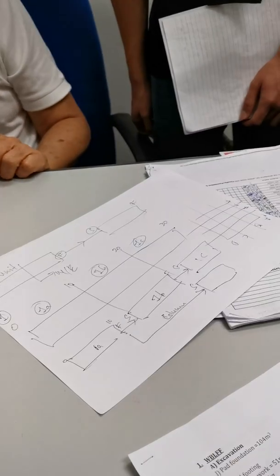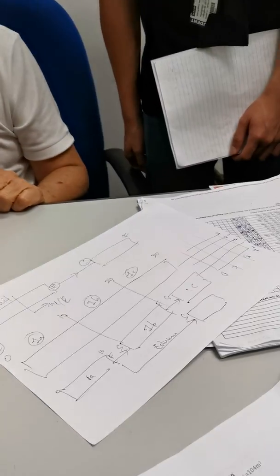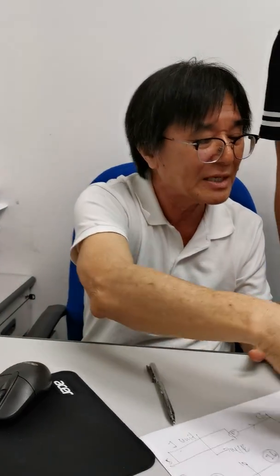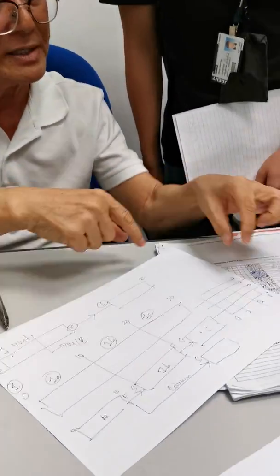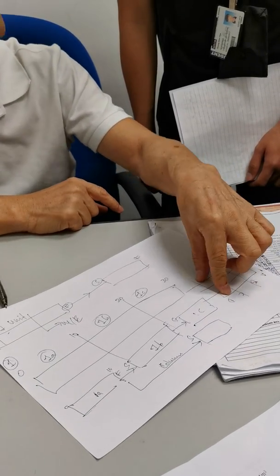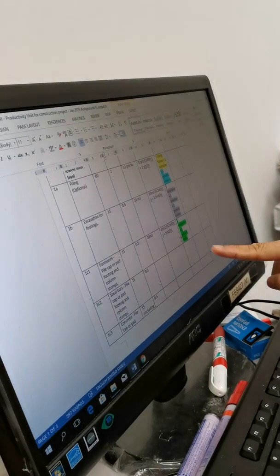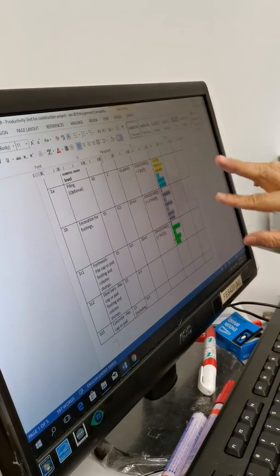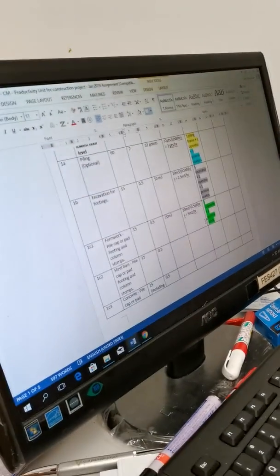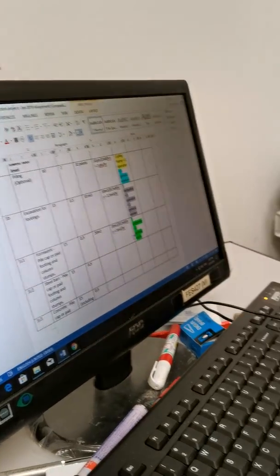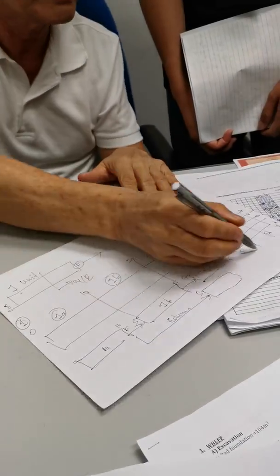It's almost 1 acre, that means 44,000 square feet. This floor slab is easily 44,000 square feet per floor. So there's no way you can cast 44,000 square feet in one day. So they will break it up into all these parts. For the project planner it will be sectors A, B, C, or then subsectors, up to them. But then this type of thing for the IPA will be adjusted accordingly. You always tie back to how you want to do it in reality.